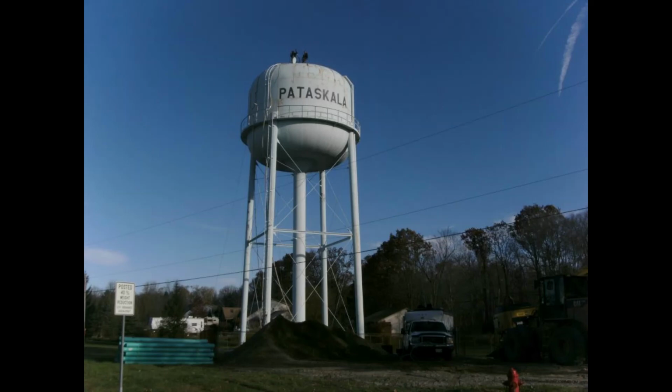Jefferson Street project. So the 2 culverts that are in the fire station, I know that they were trying to sync up their paving, but the culverts themselves were not talked about as part of this project. The elevations of them or changing them or having our contractor change them being reimbursed, this is the first I'm hearing. Would you mind checking with Alan? Because the fire department believes that they were talked about and that they were going to be handled through this project, but they're 100% paying for them. So it is possible that it went through Alan because stormwater would have been his side of things. So I will definitely check.